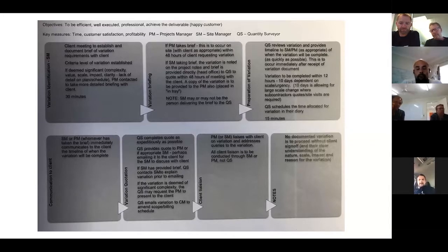But how do you deal with an architect who wants a full-on open book variation? Says, well, where's the quote for that? If you've got estimating software and they say, I want an extra 10 meters of tiles, you're not going to get a tiler to quote that. You already know what your meter rates are. I just find that with architects, they're like, well, where's the quotes for that? They believe it should be an open book, and then the margin is clear as day. So, for example, you'd have your quote for the tile, then you have your time, floor protection, insurances, Portaloo, extras. It's not just that little bit that is your variation.